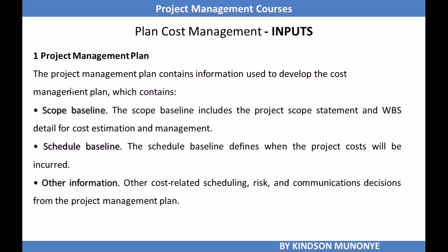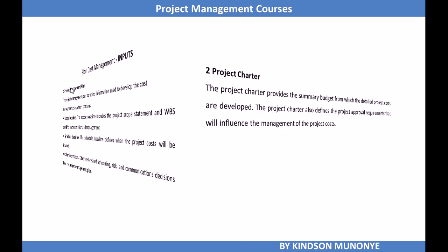We do need the project management plan for us to plan cost management, because the project management plan contains information used to develop the cost management plan. The project management plan, just as you know, contains other subsidiary plans and baselines. So the scope baseline is contained here, which is made up of the WBS dictionary and the project scope statement. We also have the schedule baseline; it defines when the project costs will be incurred. Other cost-related items may also be there in the project management plan that will help us to plan cost management.